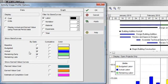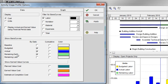I can also indicate what bars and curves I would like to display. I can display by date or with a cumulative curve, baseline, budgeted, actual, remaining early, or remaining late costs or units.